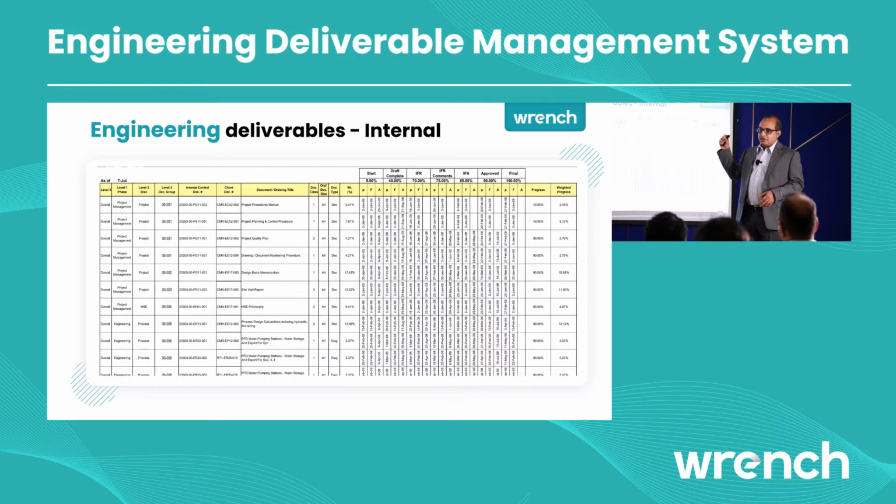And for each activity, you will have a planned date, which is identified here. And if you miss on it, you have a forecasted date. And then based on the actuals, you get your progress, and this calculated progress is what you see as the total progress of each deliverable, and this is how people maintain and monitor their deliverables. So the only difference here is the actuals are updated manually. You calculate the progress and then update and give it to your client as a report.